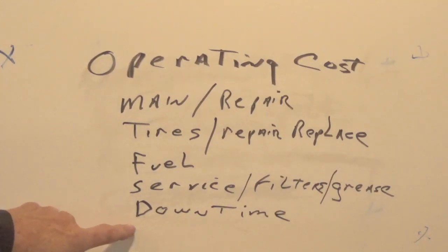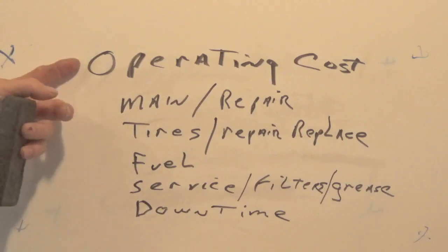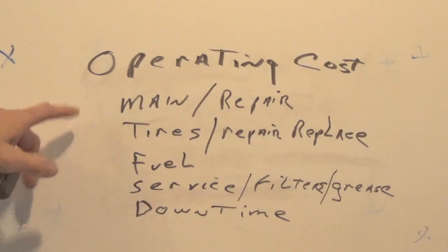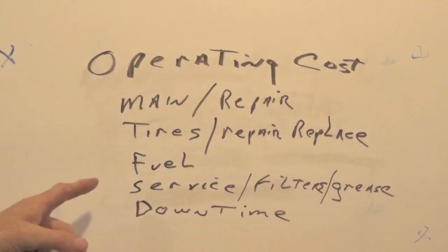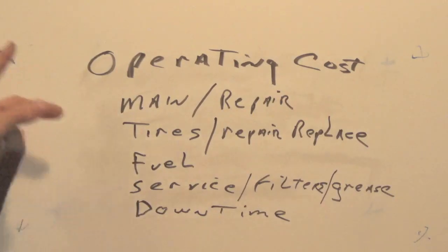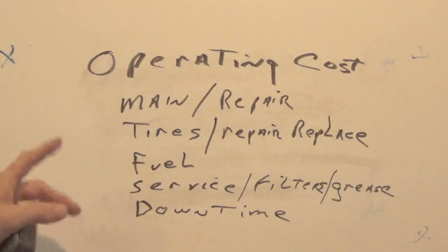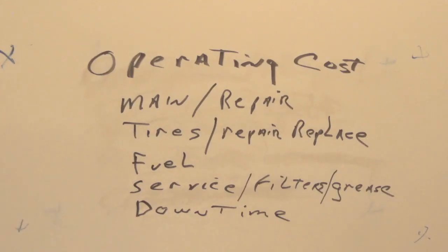So that means that when you charge someone, operating costs as well as ownership costs, all of them can be broken down by the hour, okay? And that's what this is about. Break it down by the hour, and that tells you how much to charge people, because you need that much money to stay in business. And then the last thing you have here is labor. And labor can be a nuisance, okay?